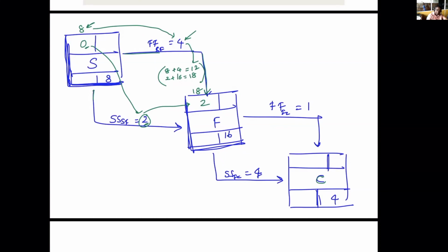Likewise, for the start of C, there should be a lag from F. This 2 is there. 2 plus 4 is 6. No issue on that. And similarly, 6 plus 4 becomes 10. And there should be a link from the finish of this activity. This finishes at 18 plus 1, 19. So we take the higher value. We have to take the higher value in the forward pass. So it becomes 19. Since the time has already passed, I will do the backward pass with this itself.